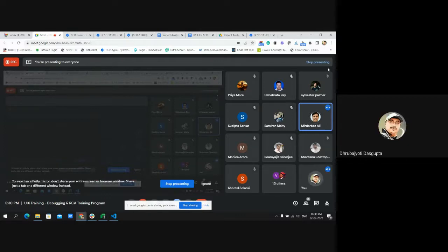Okay. The process that we set in OOP is that we have a 10-day sprint. Depending on the holidays, it might come to 8 or 9 days, but apparently it's a 10-day sprint. So our target is that in any sprint we only take tickets of up to 5 story points. In OOP, 5 story points means 5 days. So we are not considering any ticket beyond 5 story points.